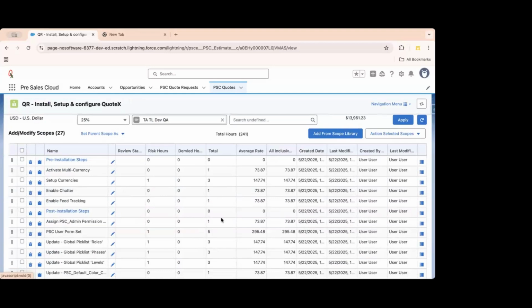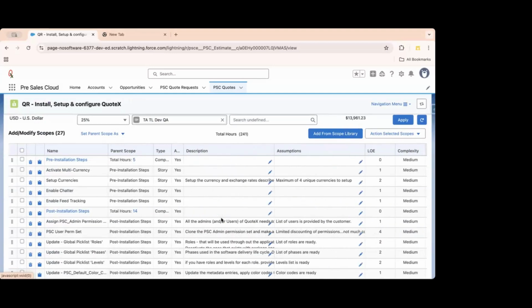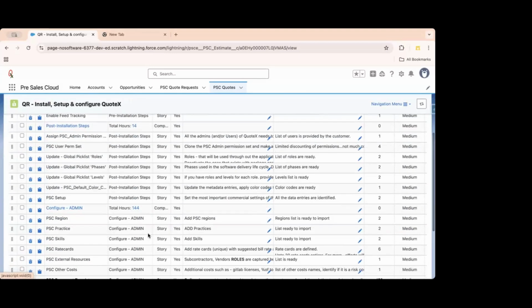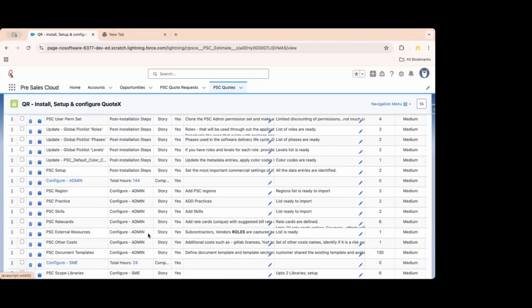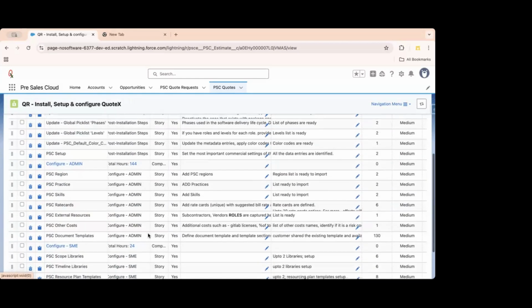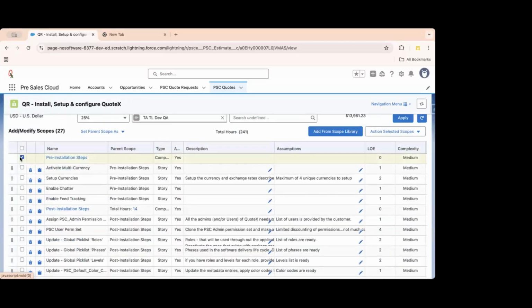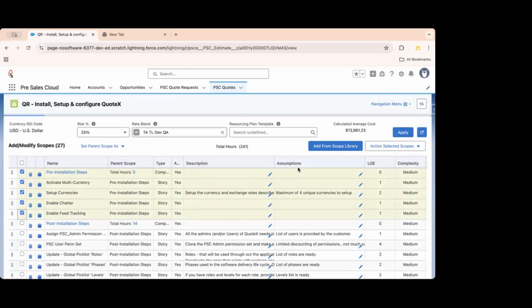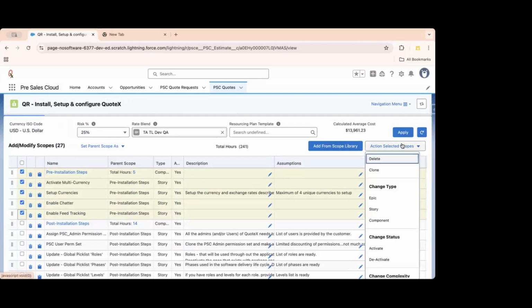All these things I can also see at the same time. Let's say that I'm a fresher and I probably do not have much understanding, and maybe on WhatsApp my sales engineer says that the customer would do all the admin activities themselves, or maybe do the installation themselves. They don't want us to get that control. So if the customer has said that they wanted to do the pre-installation stuff, we are not going to be charging them for this.